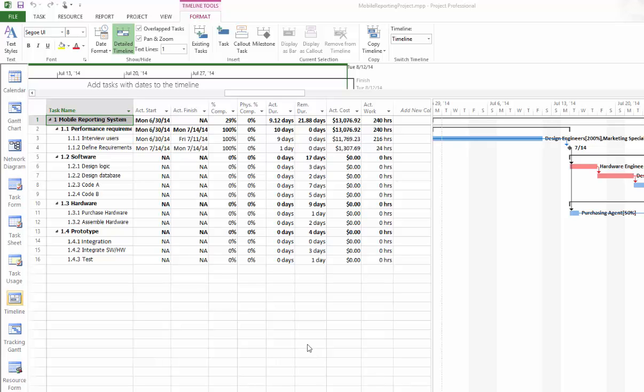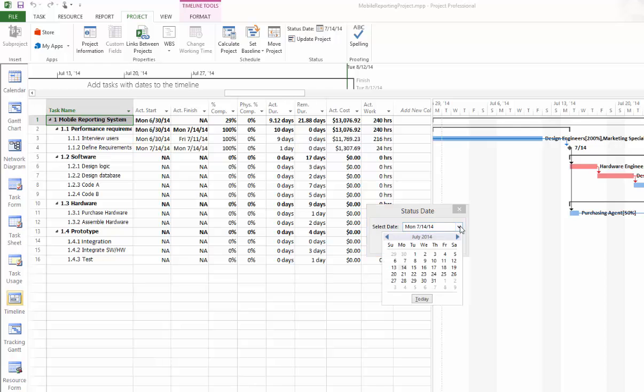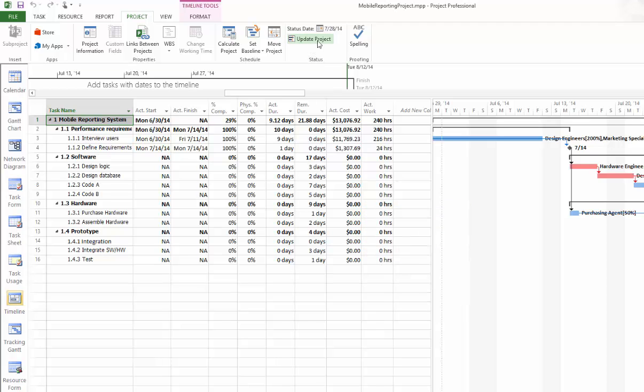After the second project period, you may need to do another status report on your project. So we're going to set up another status date and keep tracking our project. Again, go to project, and this time you can simply use this box and change the status date. Our next status date will be 2 more weeks later on July 28th. And we click OK here and make sure you see the change on the status dates. Otherwise, the result may not reflect the real project progress.